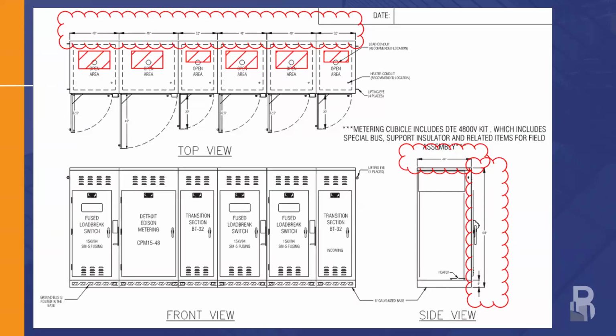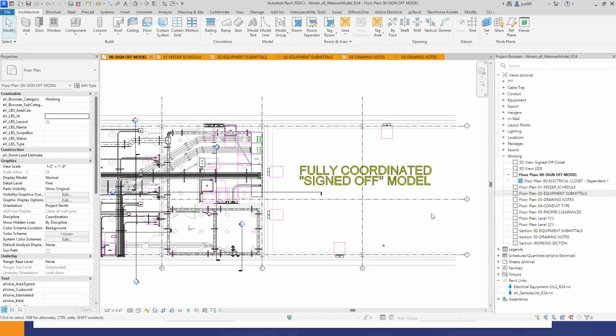And in a handful of my projects, we ended up redesigning even the smaller tertiary closets 3 times during the coordination because of a released submittal that wasn't approved. Then it got changed. Then we had to double the panel. And once again, not having the information early is a hugely important aspect of why we have this checklist.